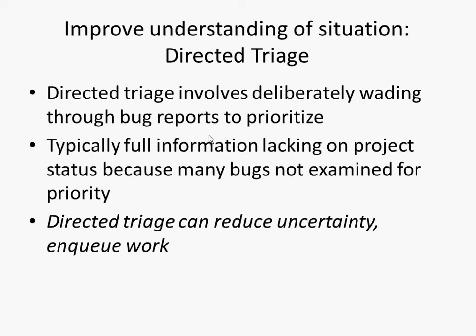How bad is this? We have 50 bugs, 50 defects reported, 50 STIs, system trouble incidents reported. Are these likely big problems? Maybe they all boil down to 10. Just a very common one gets repeated over and over again, reported over and over again without really being as big a problem. So maybe it really boils down to 10 truly active bugs there. And we want to prioritize them to indicate what level of priority and severity these have, and figure out which things we want to actually fix.